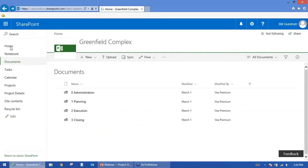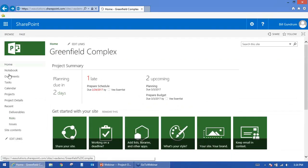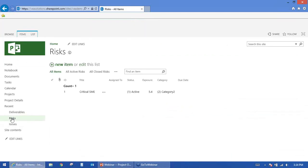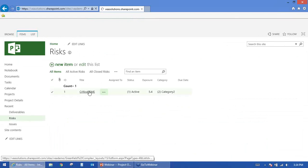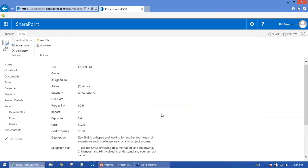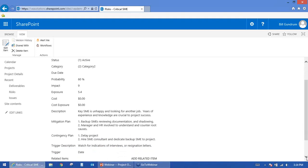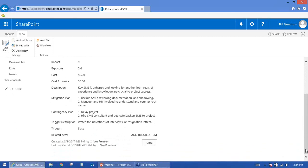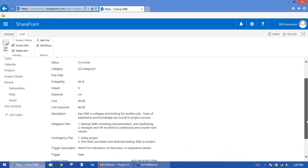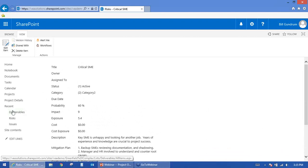The project site also includes risks and issues right out of the box. Instead of maintaining everything separately in Excel spreadsheets stored in different locations, everything is together in one system. You can enter risks or issues — they behave similarly but are separate — and you can customize different categories and fields to make sense for your organization. If you don't have anything to start with, it's pre-built and gives you a good way to begin handling risks and issues.